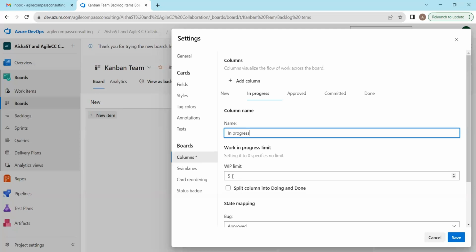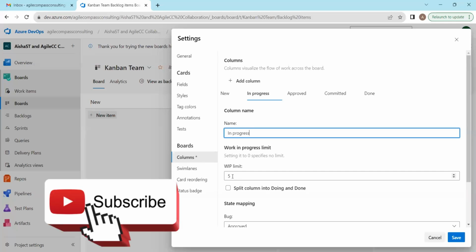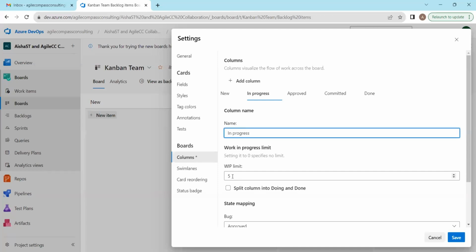Again, you should be very clear why your team is even using Kanban in the first place, because Kanban will mostly work for support teams and maybe some teams that are very high performing and that just want to use Kanban to just go on with their work, right? So setting up that WIP limit is very, very important. The aim is for us to work on one ticket at a time. But of course, with my experience working with support teams, there are a lot of times when we will have priority items that we would need to address like ASAP, right? And so we have some capacity in our WIP limit to pick that on, right?